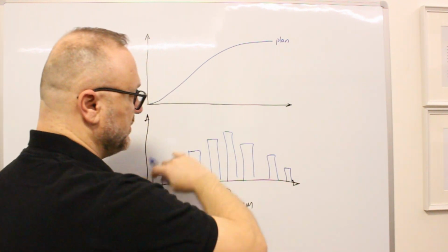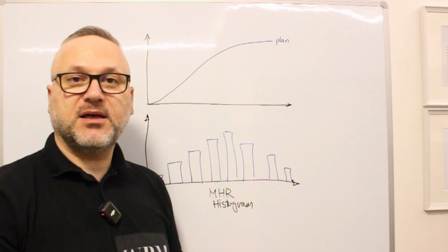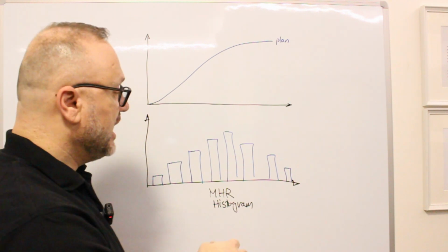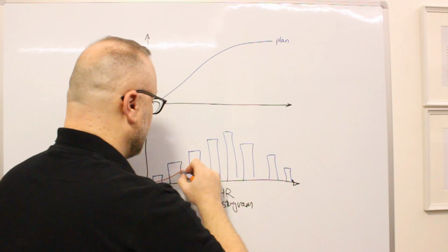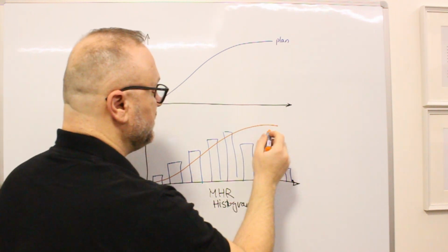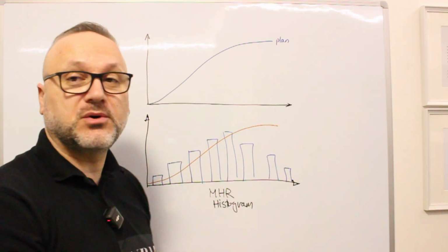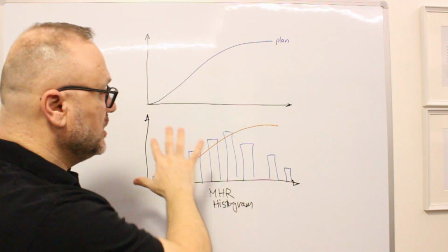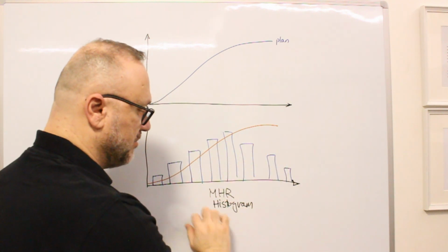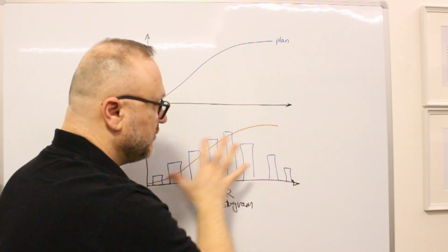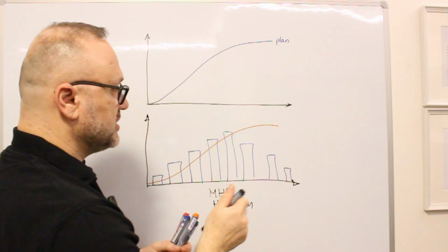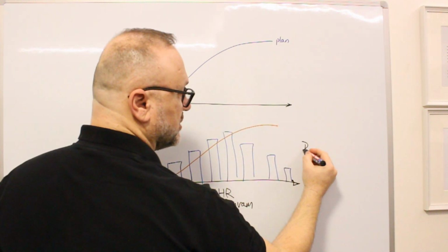You have the plan of the man-hours per duration, and this can be cumulated to have an S-curve as well for the planned resource along the project. So we have one graph for the plan of the histogram, the S-curve for the resource. This I will write here, this is a resource.